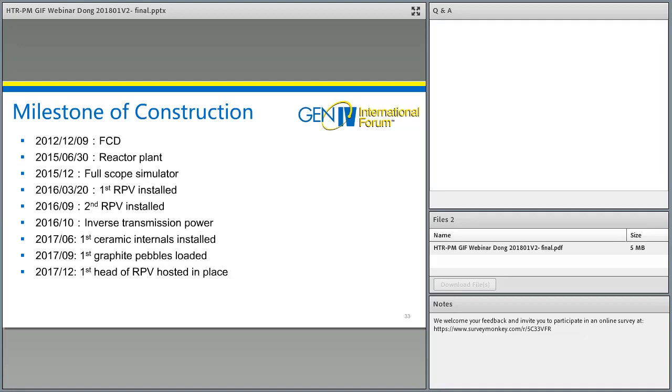Actually, this project was approved by central government on 1st of March 2011. That was 10 days before the East Japan earthquake. We planned to start the construction around the end of March 2011, but postponed due to the occurrence of the Fukushima accident.